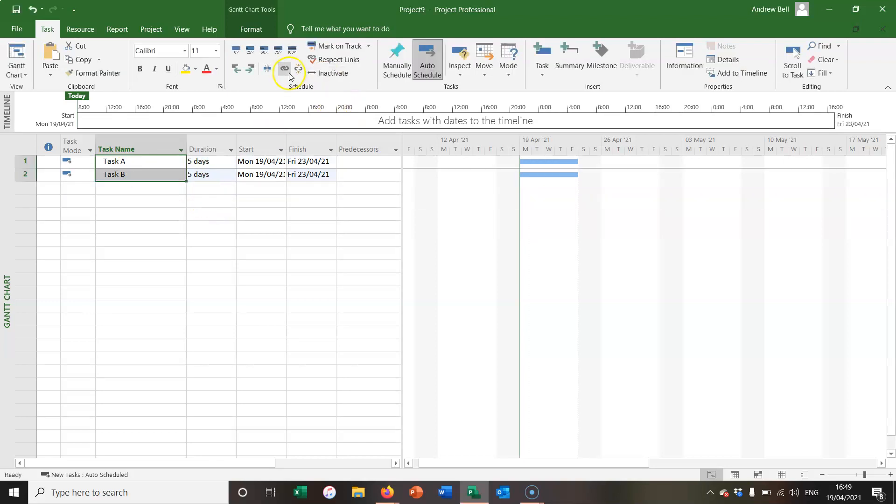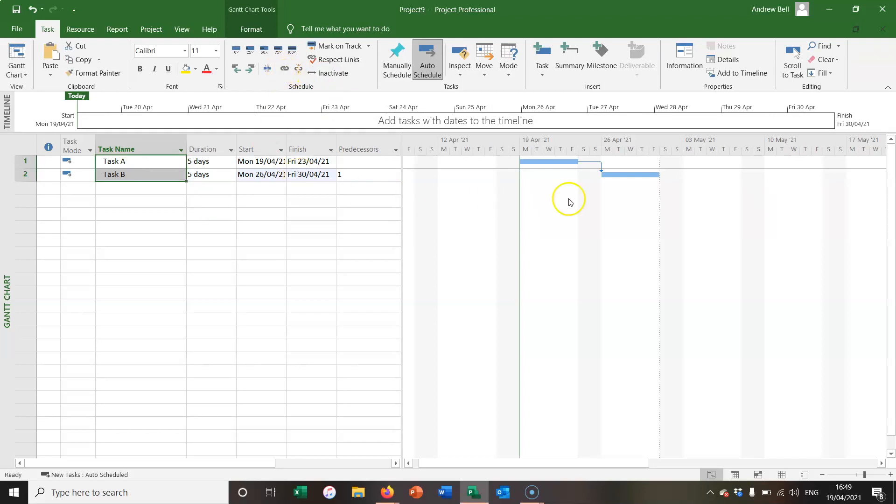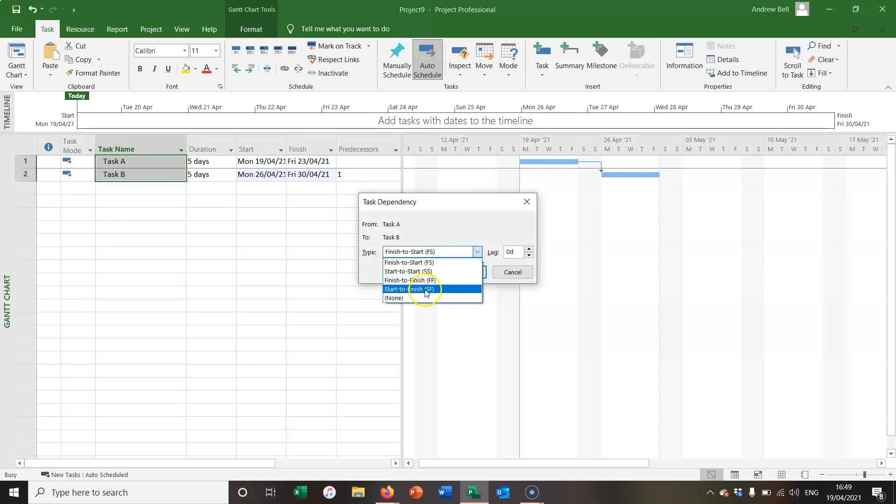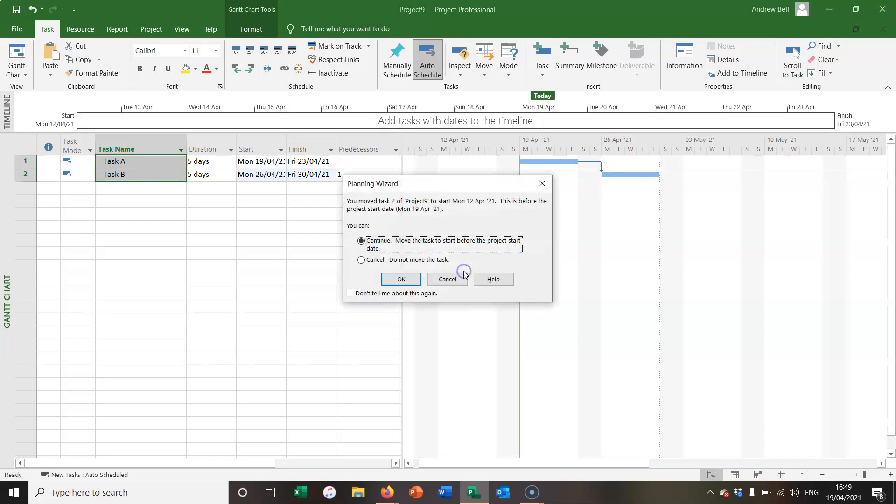I'm going to link them together first of all with a finish to start relationship, and then double click the arrow to change it to a start to finish relationship.